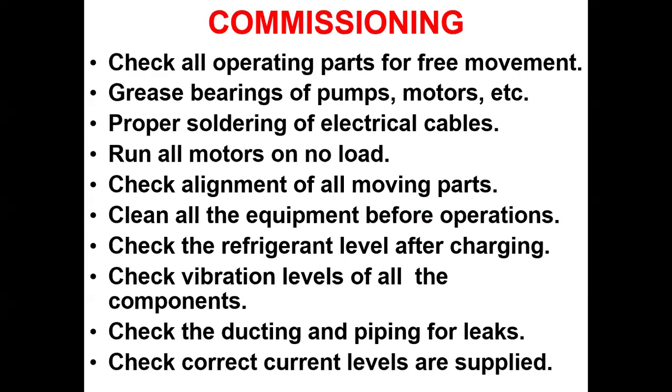All right. Next is commissioning. Commissioning is nothing but checking the entire machinery, which means checking all operating parts for free movement, greasing bearings, checking pumps, motors, and proper soldering. Run all motors on no load to know whether they are working or not. Then check alignment of all moving parts. I told you, while placing a machine on the floor, we need to raise the floor with concrete, isn't it? And if you have shock absorbers, you can use those also.